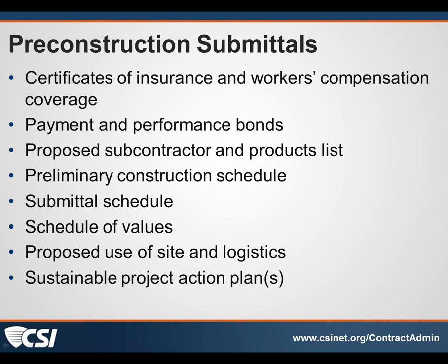They're not submittals in the sense of product data or shop drawings that we typically think of when we think of submittals. And when we get them, we should look at them. We're not looking at them to dispense insurance advice. We're looking at them to see: are they in the format that we asked for them to be in? Are we listed as an additional insured? Is the owner listed as an additional insured? Do they have the limits of liability that we requested, and that kind of general thing? And then forward those on to the owner.